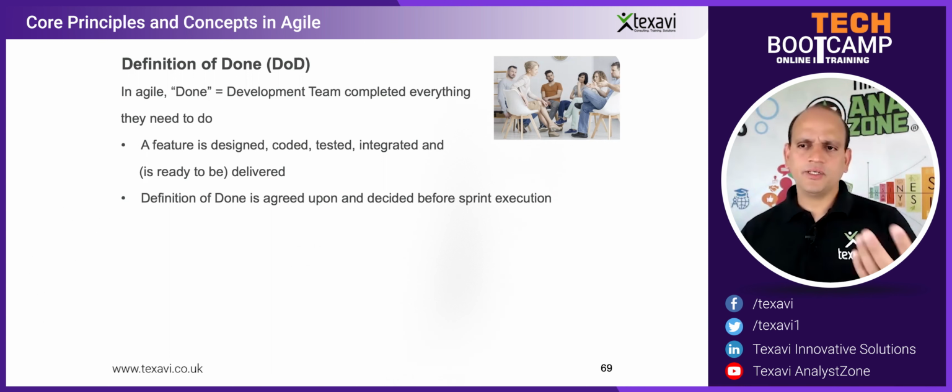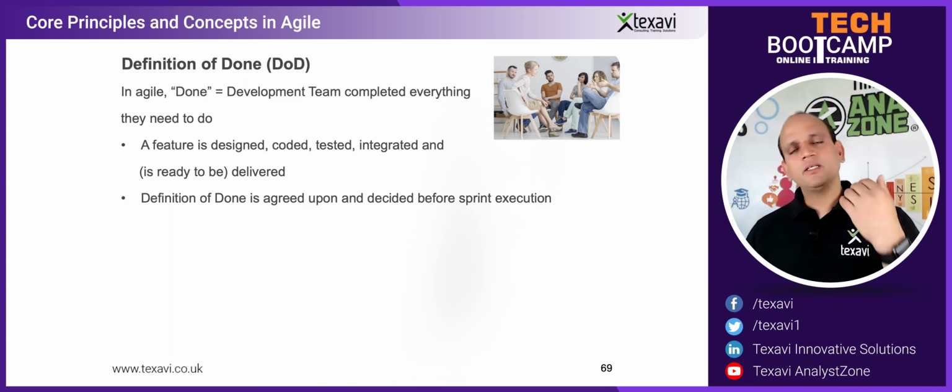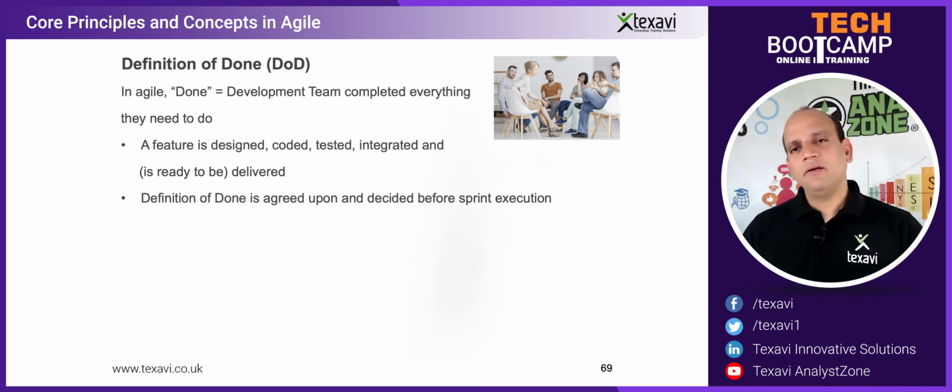All these discussions should have happened, and we should have estimated, we should have come up with the stories. And we should say that, okay, roughly it takes about 70 story points for this piece of work for this sprint, and our capacity, the sprint velocity or capacity, is basically 75 points. So we've got about roughly 3 developers, and we've got 75. So we can achieve this.